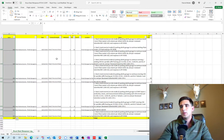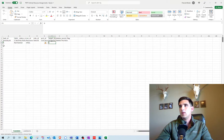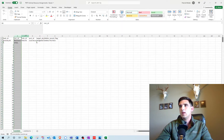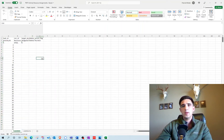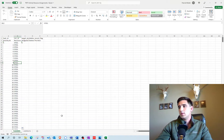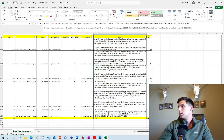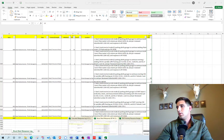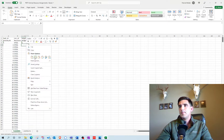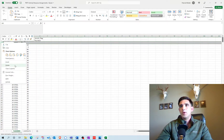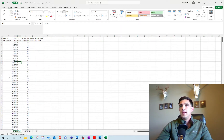I'll go back to our daily report and copy the item number — which is our Activity ID — and paste it as a value. I don't need column B (Activity Status), Role ID, or Cost Account, so I'll remove those. I'll copy the steel resource ID down for everything, since that's the resource assigned to all these activities. Then I need my budgeted labor units — I'll copy the total hours from the daily report and paste them into the template, making sure the labor hours per day match the correct activity. I'll delete the top row, save everything, and this file is ready to be imported.